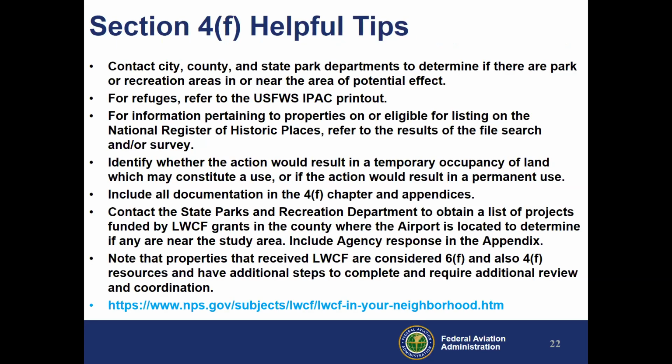Some of the helpful tips getting through 4F. Well, you definitely need to contact your city, county, and state park departments to determine if you even have a park or recreation area in or near your area of potential effect. For refuges, you can look at that IPAC printout that I spoke about with endangered species. It will show whether or not there's any property interests of the U.S. Fish and Wildlife Service.